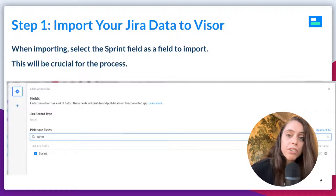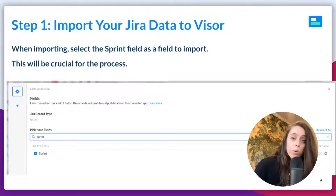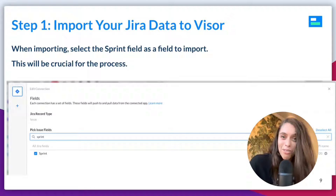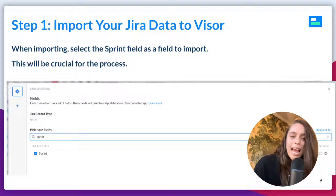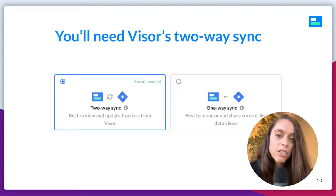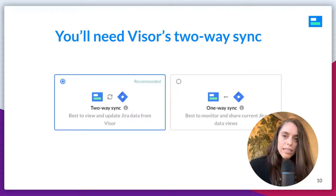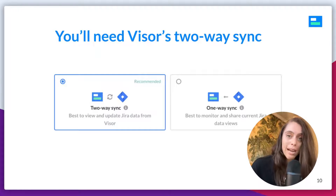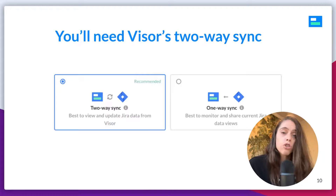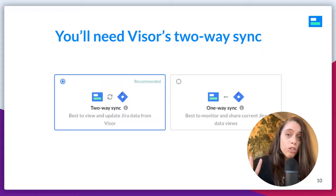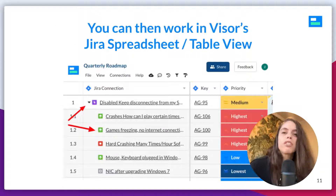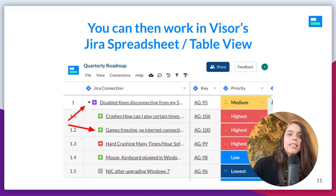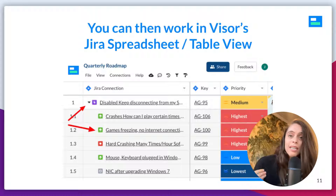To get started with Method 1 — Visor — you're going to import your Jira data into Visor. When importing, you want to select the sprint field as a field to import; this is crucial for backlog grooming for sprint planning purposes. Visor offers a one-way sync where you can only import things, or a two-way sync where you can import from Jira and then push the changes you made in Visor back to Jira. You'll really want to choose that two-way syncing, because it brings your Jira data into a nested spreadsheet that has all the hierarchies already established in Jira.